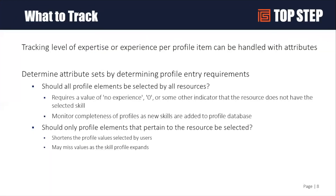Once you decide what you want to track, you have to decide if there's a secondary category that goes with each of those. Things like level of expertise, years of experience, or whether a certification is current or expired — those are all called attributes. The attributes are defined at the level of the skill category that you set up. You define the attribute, then you link the skill type and the attribute together to get your full profile.